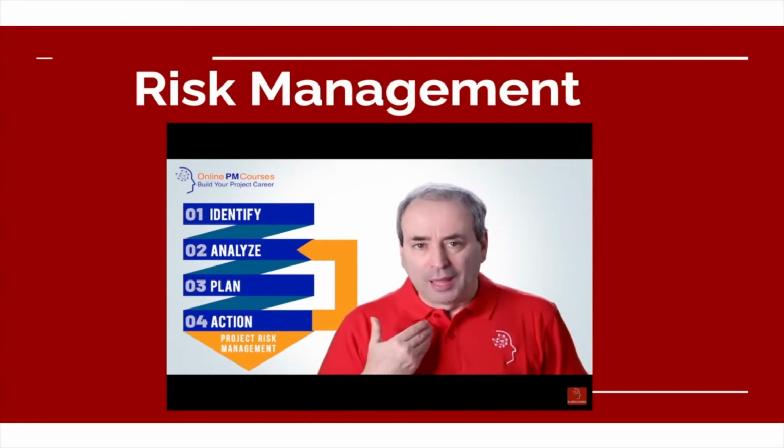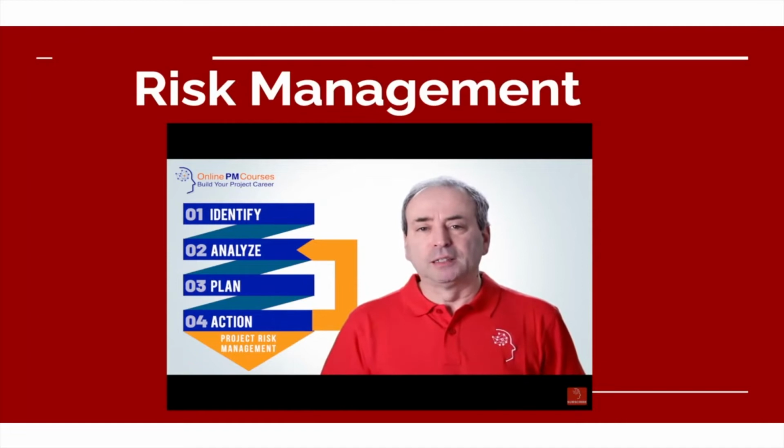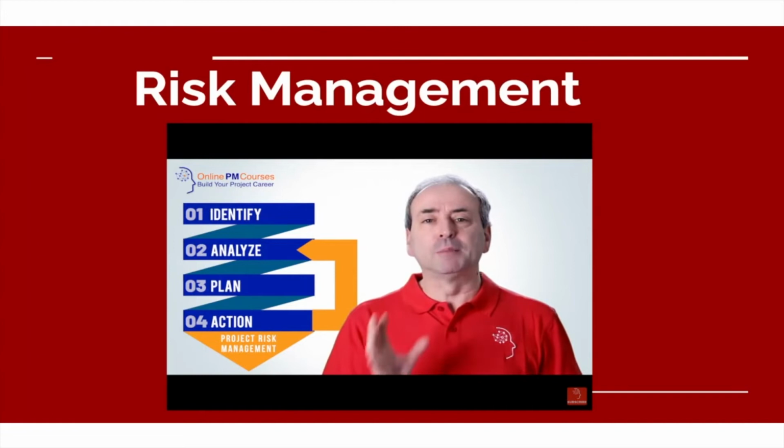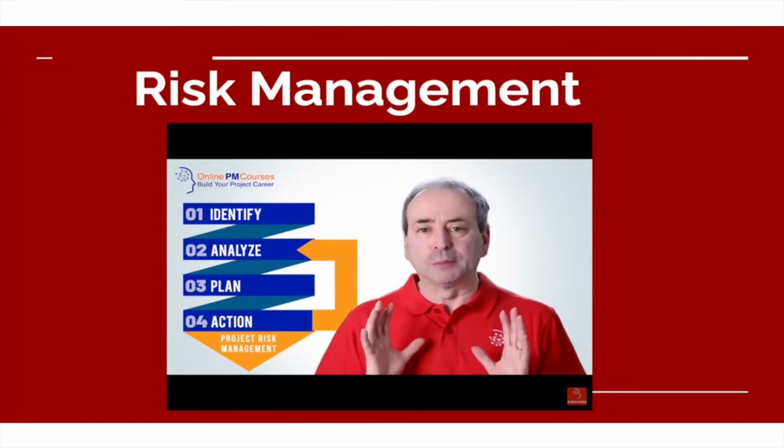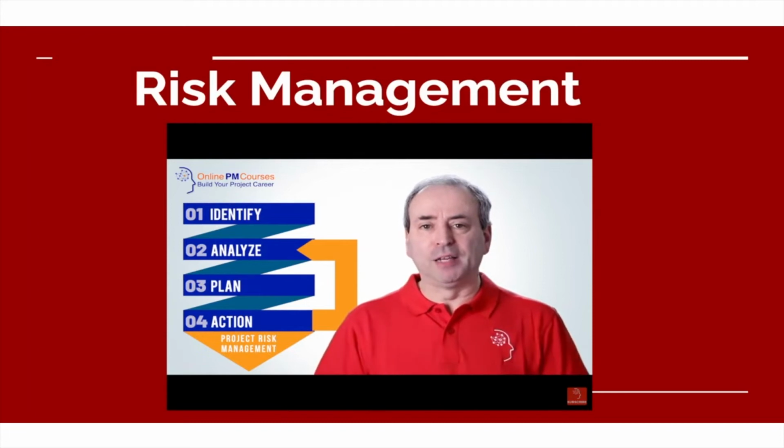You've got to allocate each risk to a named individual, make them responsible, and follow up. Make sure that changes are happening. If you do all of this, you'll find that risk management becomes part of your routine. And when you do risk management well and effectively as a part of a regular project management routine, you will stay in control.